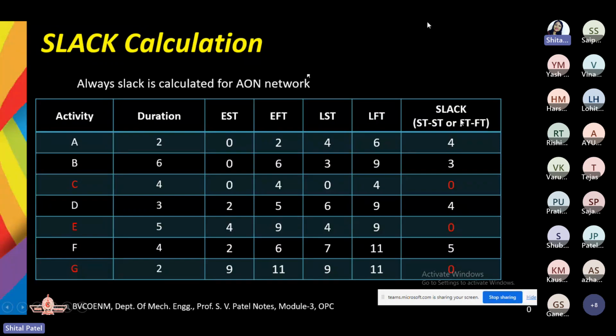They can ask you in this way: find out the slacks of this particular project, right? What slack is and what float is, I have already mentioned in my previous slide, which I have shared with you. Here, these are the activities given to you. For activity A, whatever times we have, the earliest start time and earliest finish time, then the latest start time and latest finish time, whatever we calculated previously in the diagram, you need to depict in terms of a table. These numbers are just from the network diagram I projected, in table form. Am I clear?